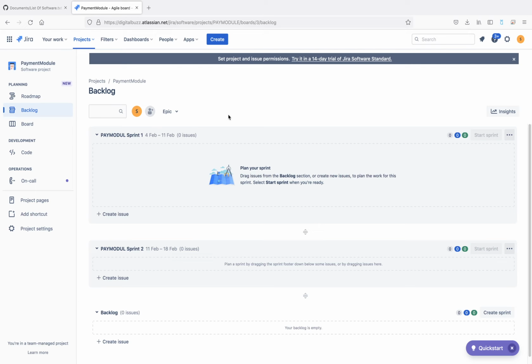For example, if you are going to develop that app, first you need to work on the registration and login API, then other functionality. If you do other functionality first, you will not have proper testing, since without login and registration you can't develop the remaining functionality.